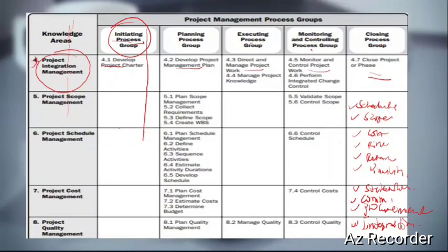So talk about why we are doing the project. So justifications, objectives of the project, what could be the success criteria of the project, what could be used to measure project success, what could be the initial requirements. All these ones will be in the charter. How much are we looking at? Don't forget this, you can't bank your hopes on this because it's high level. So we think about how much will this one cost.